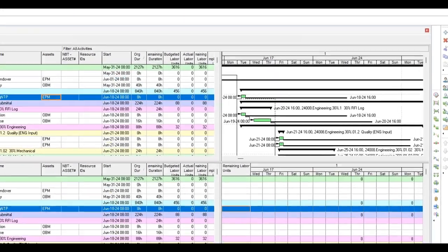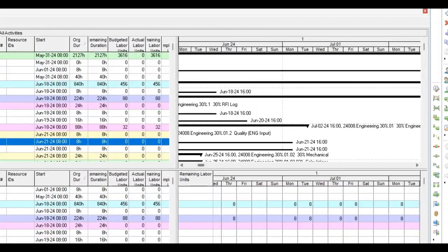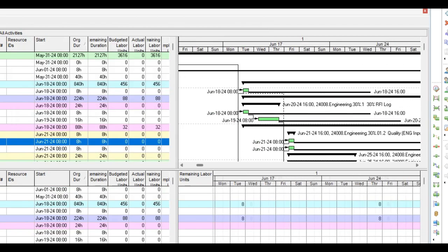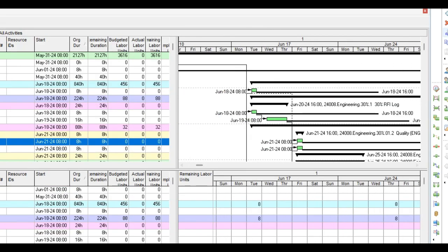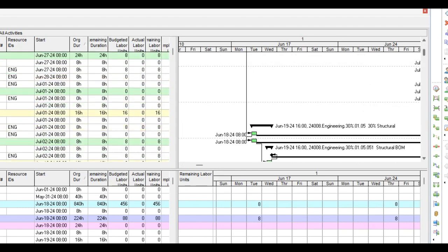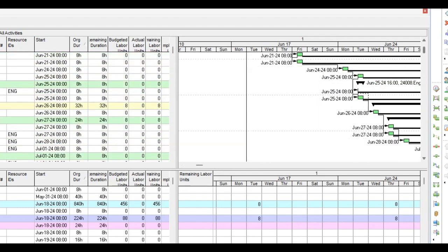Display the Project Baseline bars and Project Baseline milestones and move them both to the bottom of the form to ensure the relationships would be displayed on the current schedule bars.